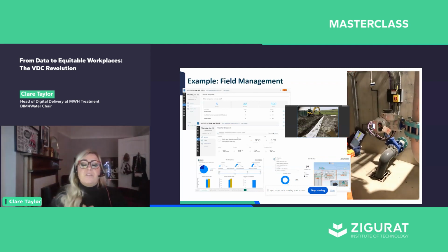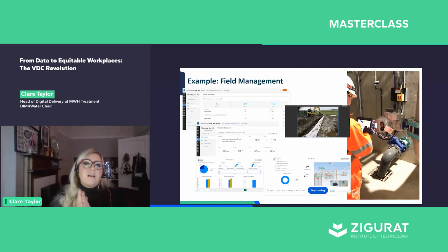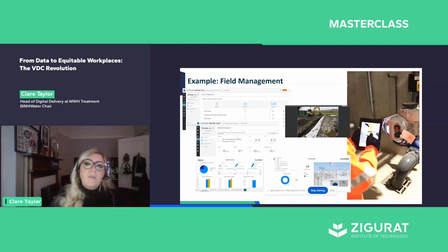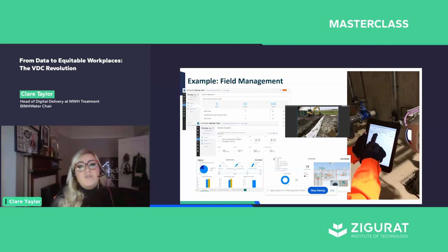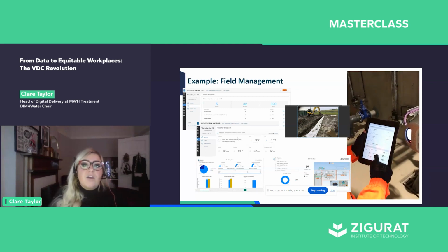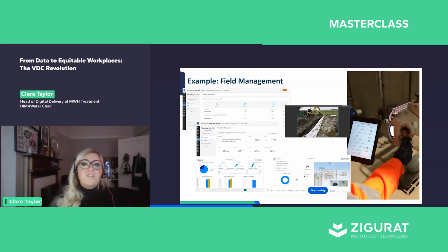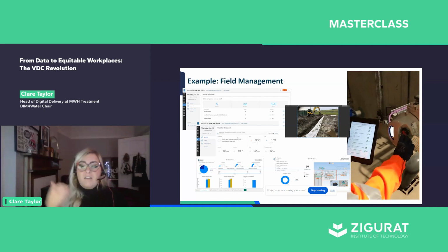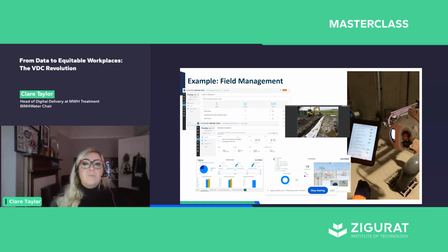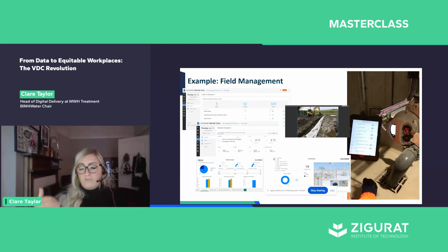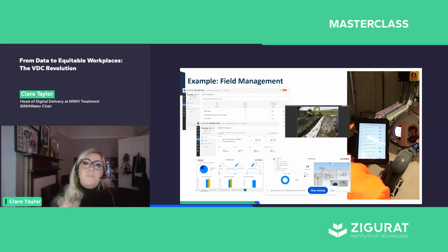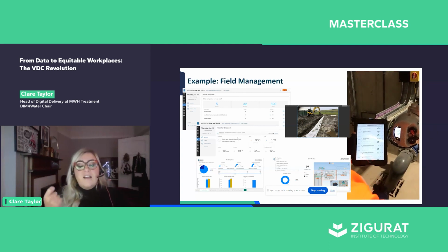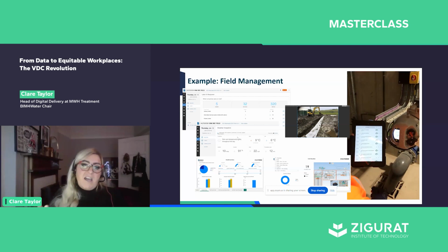And then field management. So once we are in the field, how are we ensuring we control the quality assurance for ourselves as a contractor, but also our subcontractors? So here, giving the guys iPads and using digital forms so they can go around and check off equipment checklists to make sure, yes, they've turned and run through that sequence and can wet sign copy. That's our evidence pack to provide to the client as an acceptance to operate those bits of kit.